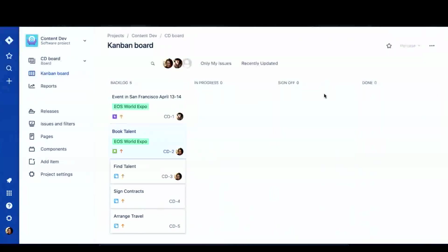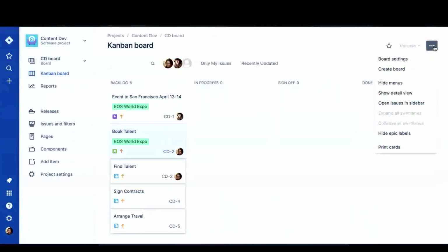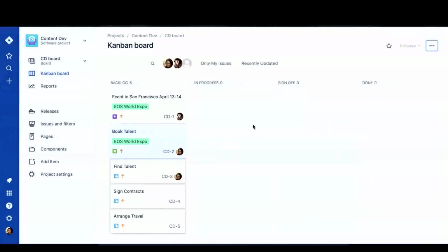And so there's something called a sprint. A sprint is just an arbitrary period of time to do work. It can be as long or as short as the project manager decides. Typically in software, sprints are 2 weeks. I know Trenton and I, the way we've set up the other Kanban board is for 2-week sprints.